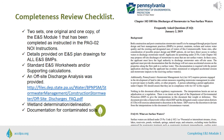We verify not only that worksheets and calculations are provided, but that they are the correct worksheets. If only Standard Worksheet 12 for sediment basins was submitted, that won't do — an incompleteness comment will request that all necessary worksheets for sediment basins be provided for review. If the project site requires an off-site discharge analysis to verify that runoff is being properly managed during construction and will not cause accelerated erosion, we will be verifying that not only was this provided but that it contains the necessary information.